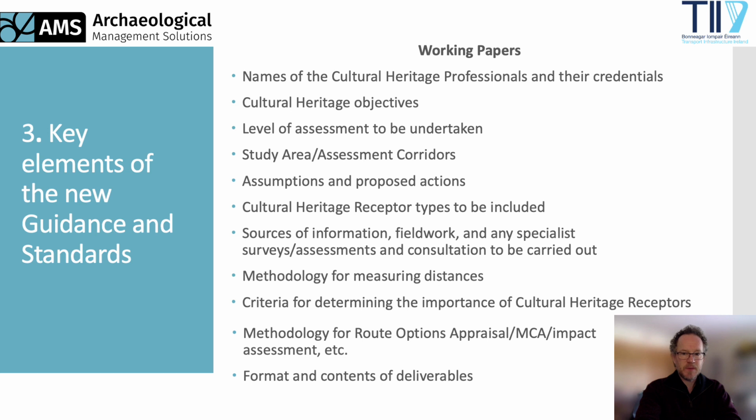the level of assessment to be undertaken, which will be commensurate with the nature and scale of the project, the PMG phase or stage, and the required assessment and approvals processes, as well as the nature of the receiving cultural heritage environment. The study area, or assessment corridors, including any variations recommended for cultural heritage. Assumptions and proposed actions. Cultural heritage receptor types to be included. The sources of information, fieldwork, and any specialist surveys and consultations to be carried out.